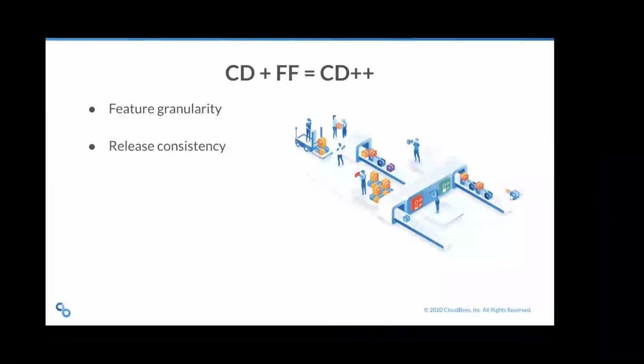Next up, for the release managers on the phone, hopefully this gets you a little excited, because you now have release consistency. There's a steady stream of innovation. You can ship all features that are ready on schedule, and you can turn off the ones you don't want in production. No longer are you having any sort of major delays, because you can disable that buggy feature, fix it, and turn it back on at the given time in production. Hopefully this gives a level of comfort and standardized velocity moving forward that you didn't have before.